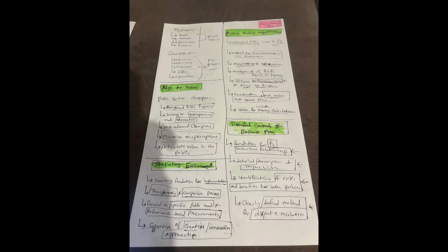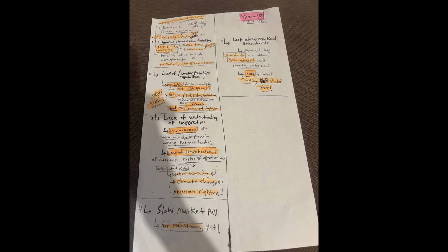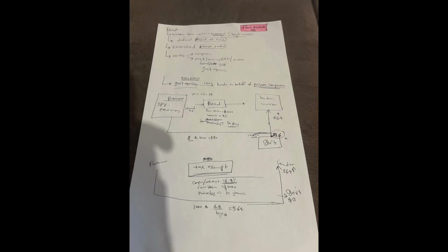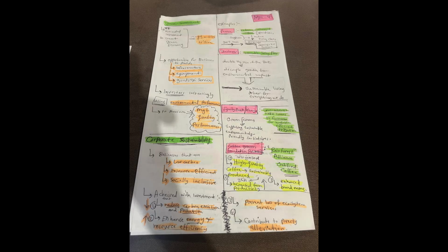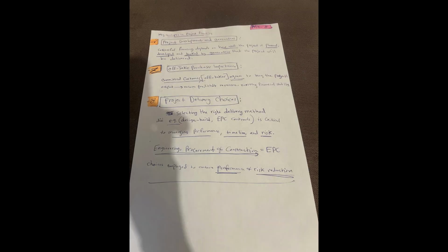And the operations and maintenance O&M agreement? Usually a separate deal with a specialist O&M contractor, defines exactly what they have to do to run and maintain the facility, the performance standards they must meet, and the penalties if they don't. And the SPV needs to be able to enforce that. Absolutely. The O&M performance directly impacts revenues and the ability to pay back debt. So the SPV needs mechanisms to monitor the O&M contractor and, if necessary, replace them if they're underperforming.